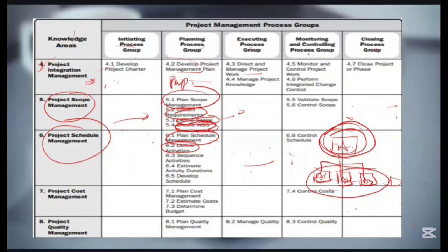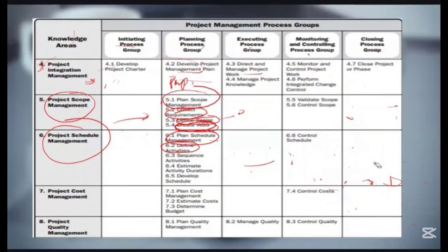So we need to look for the lowest level activities, the specific actions that we have to do. If I say foundation, you don't do foundation. You break it down to know the little things you do. If I say chapter one, you don't do chapter one. There are various topics under chapter one. If you could build those topics, you have chapter one. And even when you pick a topic, there are subtopics. So you have chapter one as C. If you break it down, we have topic A, topic B. If you break topic A down, we have subtopic A1, subtopic A2. For topic B, we have subtopic B1, subtopic B2.